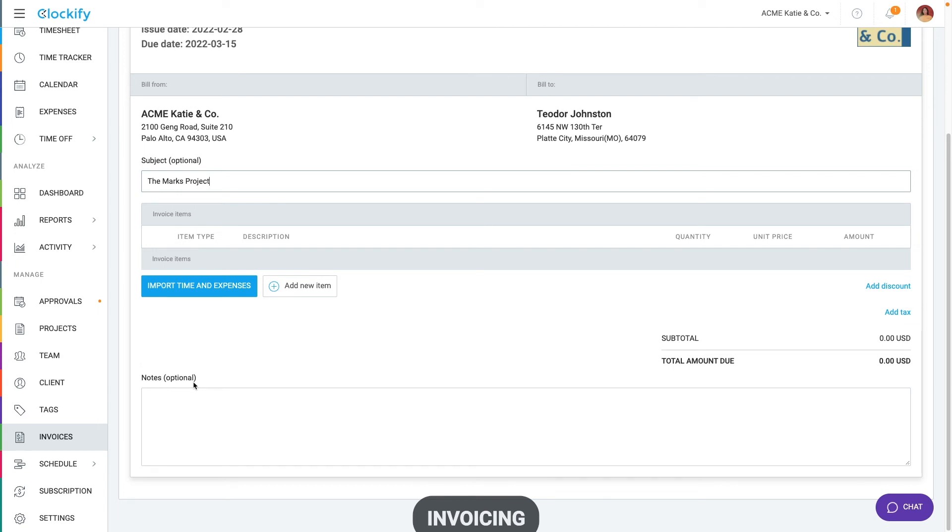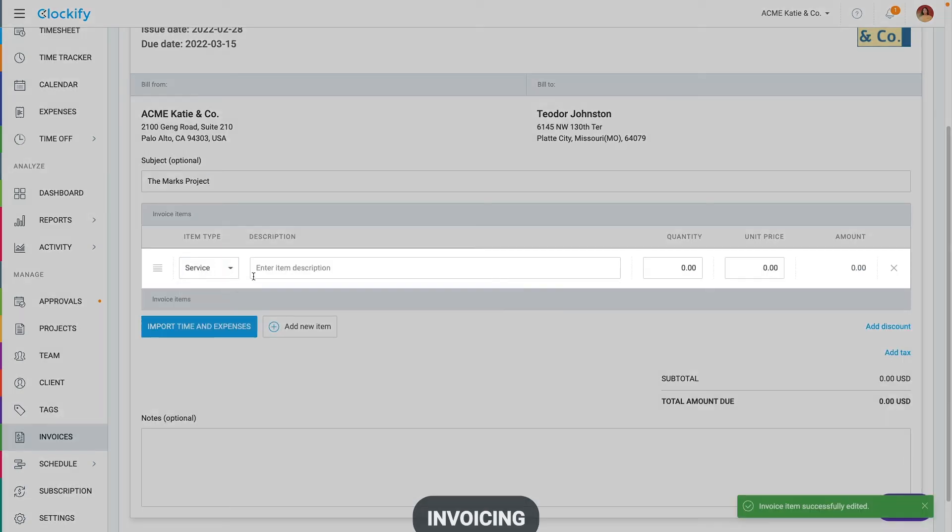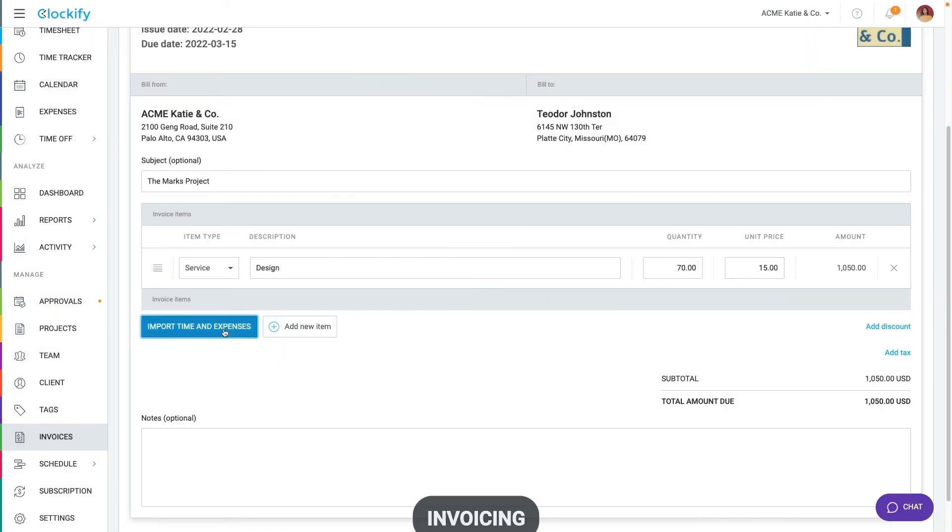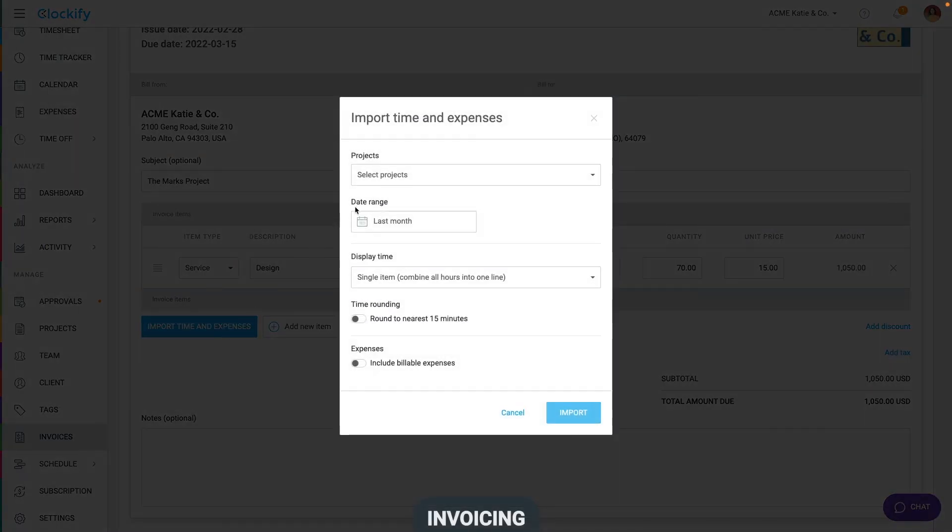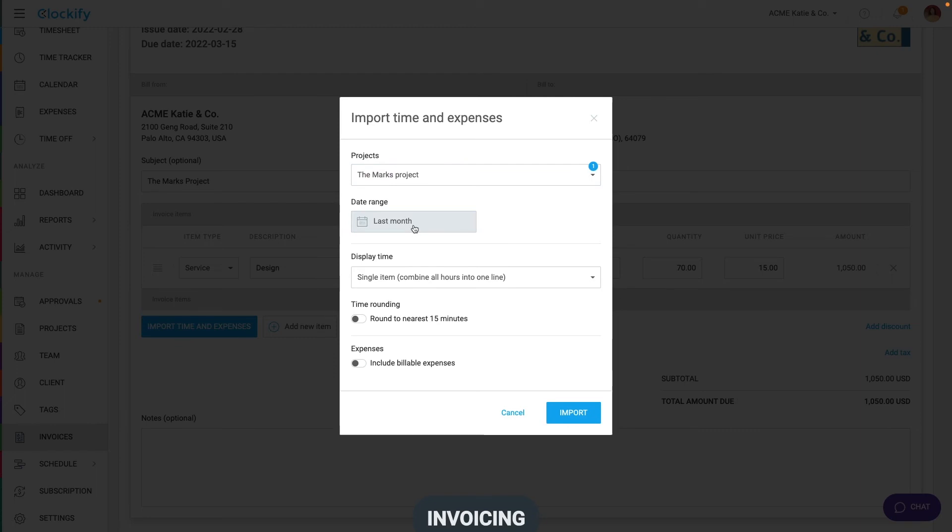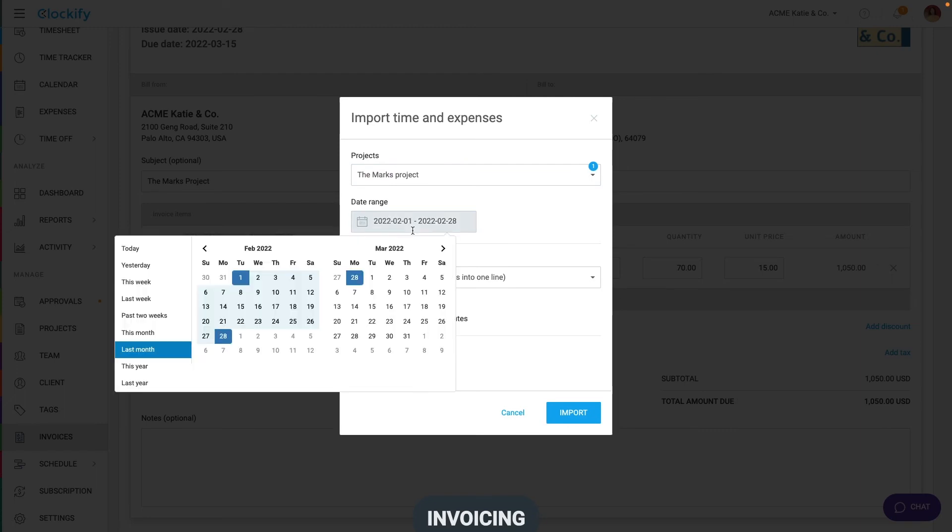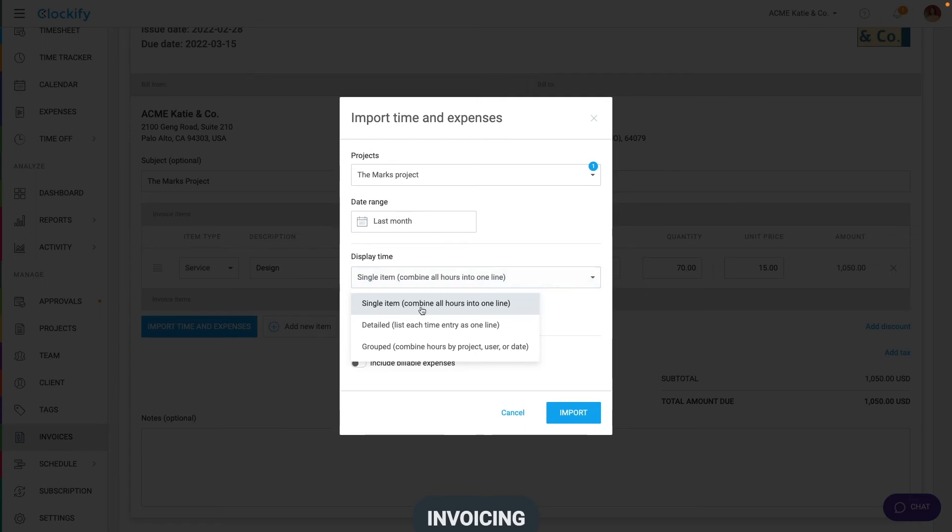Let's populate the invoice now. You can manually create items by typing description and entering quantity and price. Or you can click here to import time and expenses you've tracked. First, you'll have to select from which projects you wish to import stuff and from which to which date. Then choose how you wish to display time. You can roll everything into one item, display each time entry as a separate line item or group by project or some other dimension.